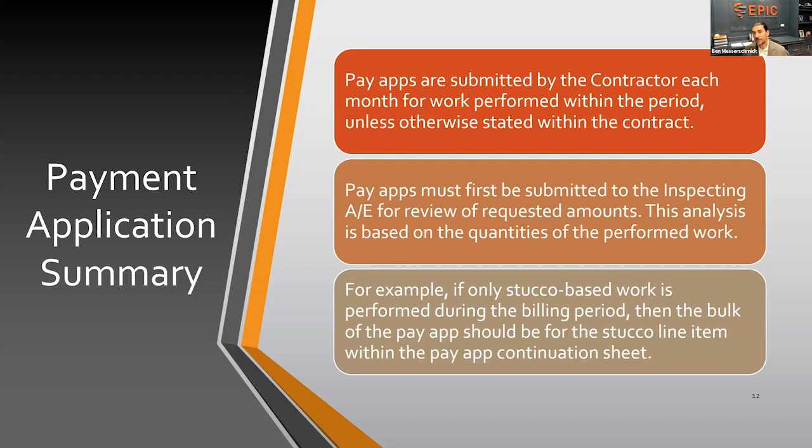So they may bill at different times. But typically for a standard restoration-based contract on a community, it'd be monthly payments, monthly draws. In a typical payment application platform, it's going to have quantities of repair, which are going to be very important. And those are going to be, again, tying back to the plans and the bidding process with the contractor.